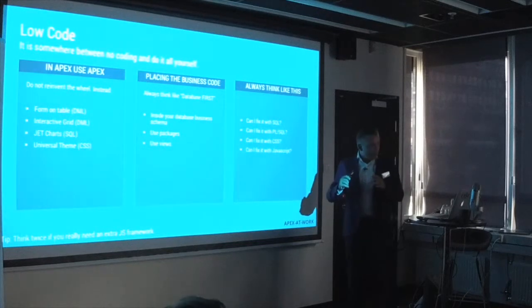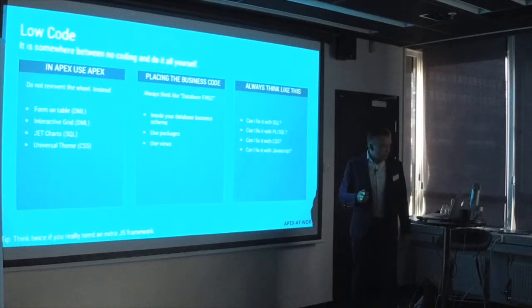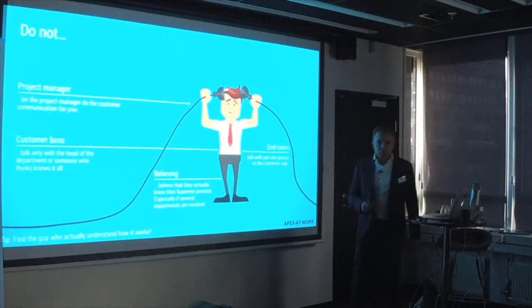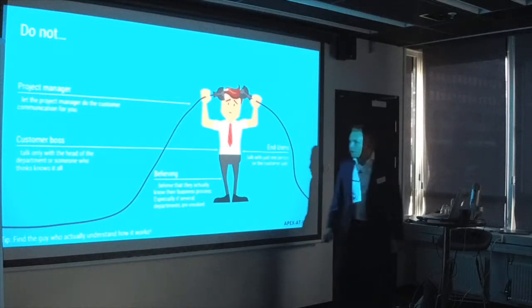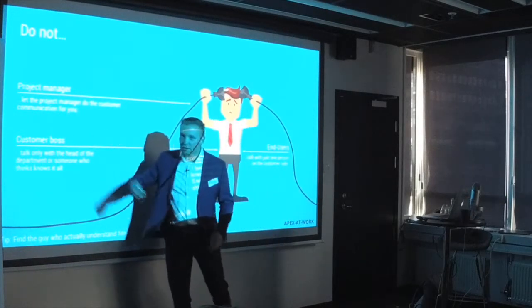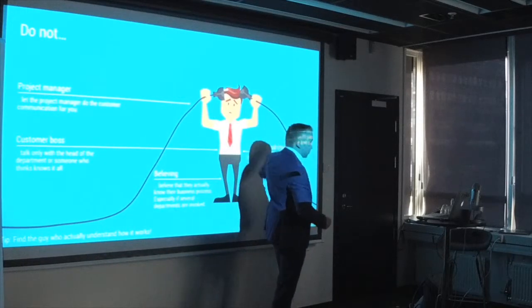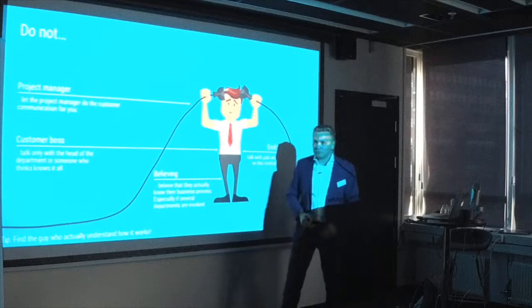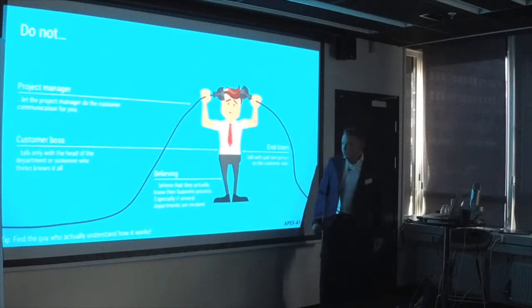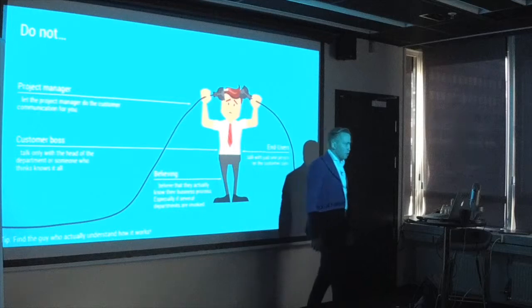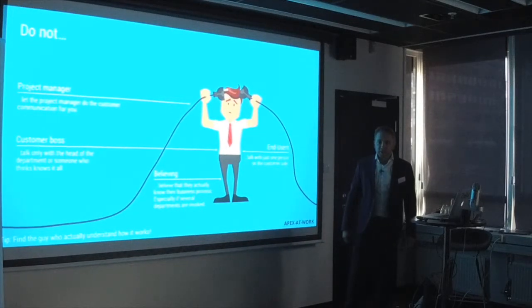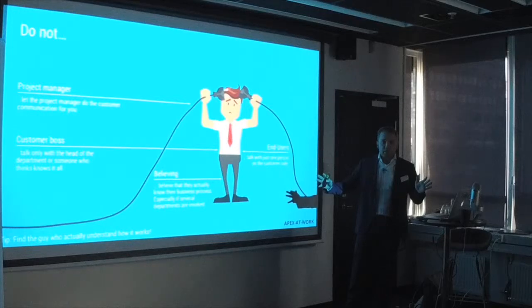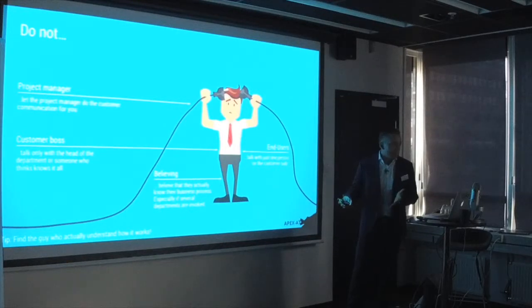How often do you get a customer that won't let you talk to the end user? I had one this year, and I stopped the project with him because he said in the first meeting, I am the end user. Yes, but you are the project manager. No, I know everything the end user knows. And it was a project going over several departments. So I made a prototype over 20 days. It worked out great. But then I stopped it because it made no sense. The customer doesn't get what he needs.